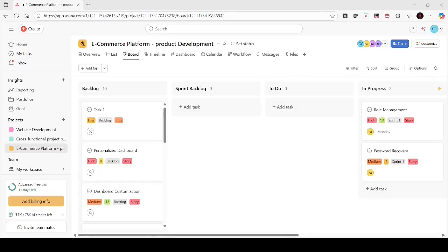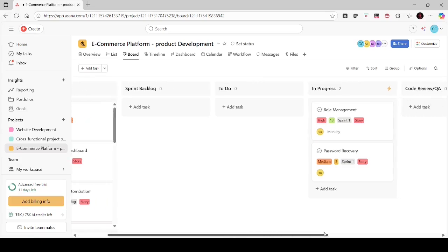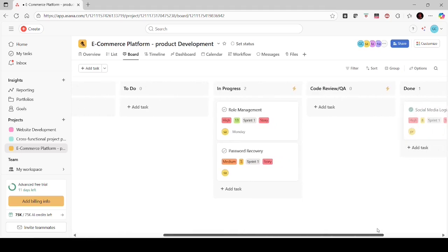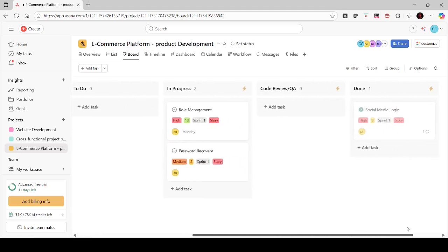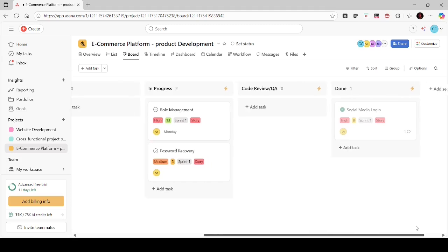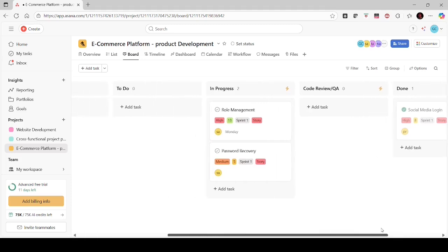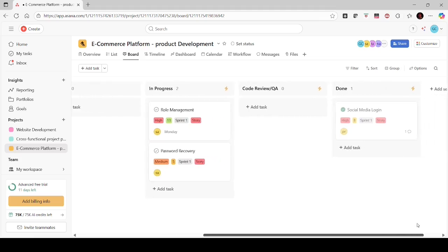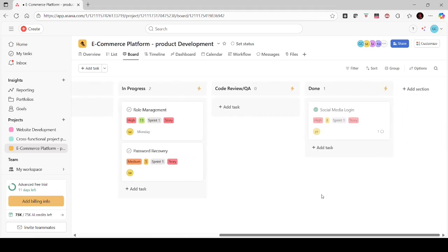During daily stand-up, this board view will be presented in front of the entire team, so that the team will be able to know the state of each task assigned in the current sprint. So if the stand-up meeting is going on, I can clearly understand that out of 3 tasks assigned in the current sprint, 1 is done and 2 are in progress.